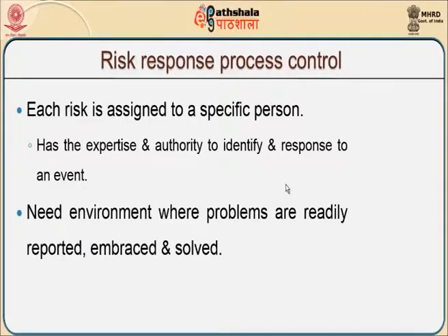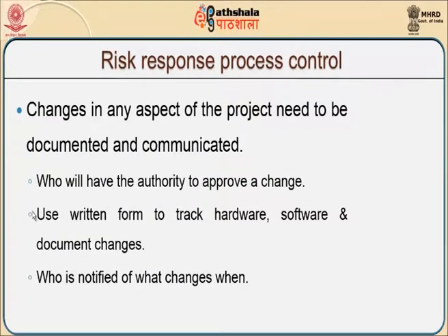So, we need an environment where problems are readily reported, embraced, and most of the time also solved. Because of this risk response process control, we will be able to identify the person who is responsible to look after the risk, and there should be a person in top-level management who can approve on the risk. There will be other persons who can approve the changes that are associated with the risk,